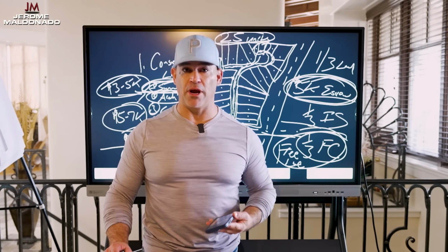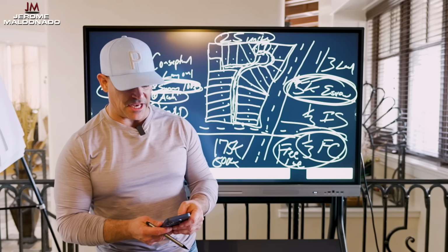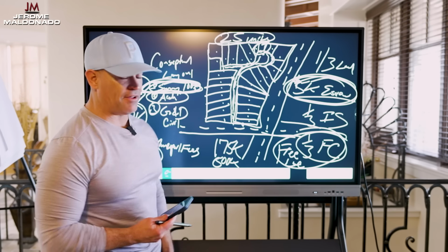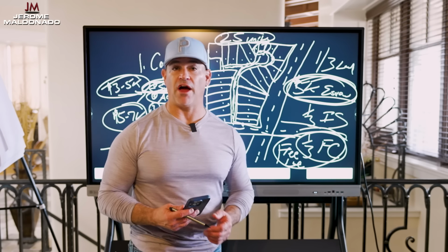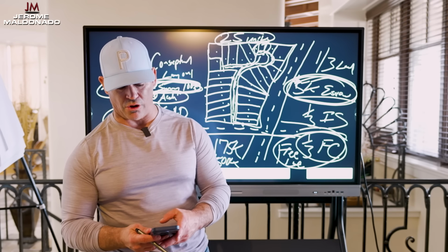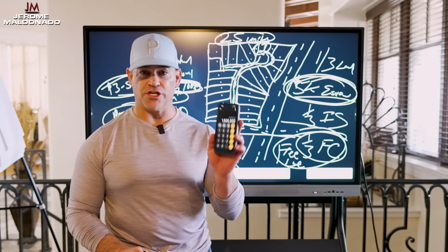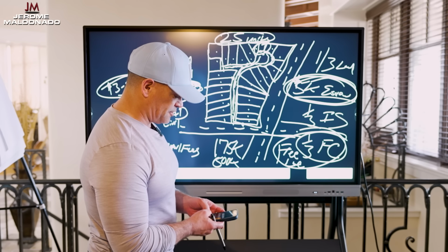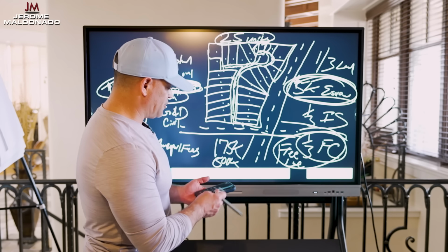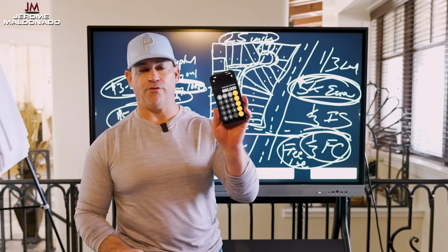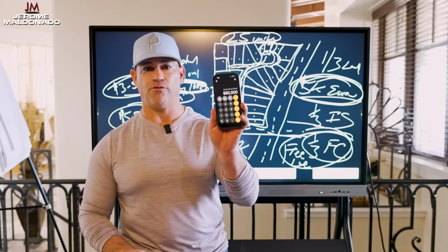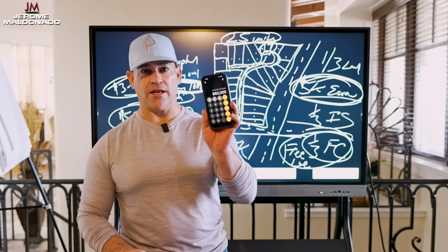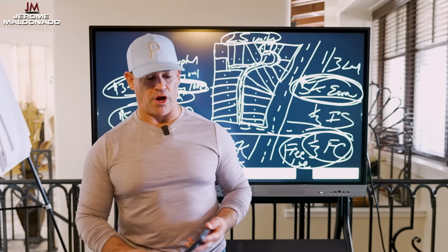Okay, you take it to the second breakaway point. Let's say that you go in and let's say it takes you to go put the infrastructure in. Let's say it takes you $500,000 and you're in $500,000, but now the lots are each worth $65,000. Now you take $65,000 times 25, and that's $1,625,000. You take a subtraction of $675,000 minus the $13,000. You're at about $940,000 in profitability, guys. $940,000 in profitability going to the second breakaway point. Now, if you do that, ladies and gentlemen, you go in, you de-risk your project, and you profit from it.